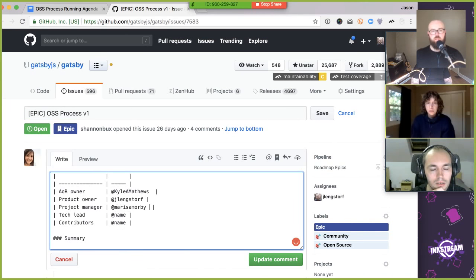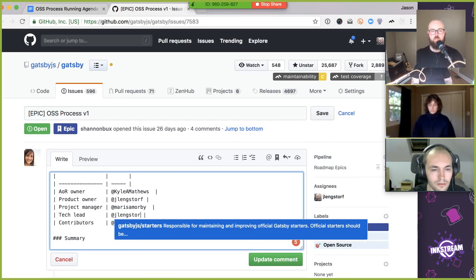Yeah, so we want to define these metrics. If we're talking statistics, we want the 75th percentile to be one day for any response to an issue, because that would be five days a week, within 24 hours. We want the 90th percentile to be 72 hours, because that would include weekends. That's what Sam told me, and I'm just choosing to trust him.